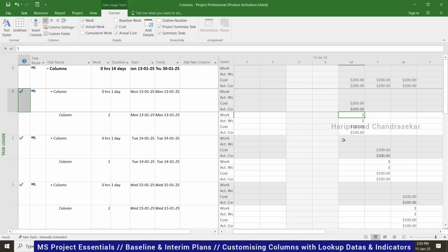You got the point. Now even in the work, you need to put the man hours. Actual work is supposed to be 8, but maybe he is working for 10 hours, 11 hours. Then you need to put 11 here. So here by default it is 8, so that based on this, the end value calculations will be done. You got the point now.